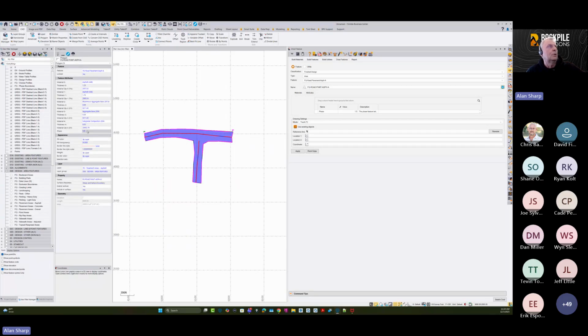So here again, all the asphalt quantities associated with that for the different materials that are in that. And that material list can have asphalt, two layers of asphalt, aggregate. It could have a geomembrane, a tack coat. It could have a subgrade, stabilization, lime stabilization, surface treatment at the bottom. And each one of those gets quantified directly.